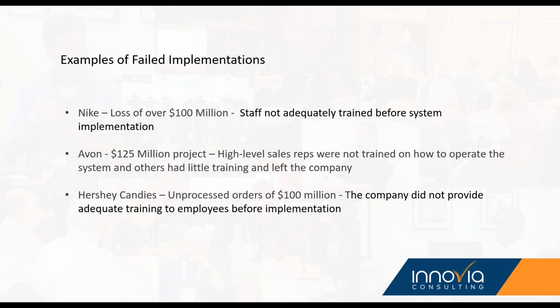EDI, that's another example. Did we test our EDI functions to make sure that we can ship them? That's a big missing oops that I actually forgot to put on there, which is EDI. Did we test all of our trading partners? Did we test all of our documents? It's very easy to go and feel comfortable and say, yeah, I tested with 1 or 2 partners, I'm good.